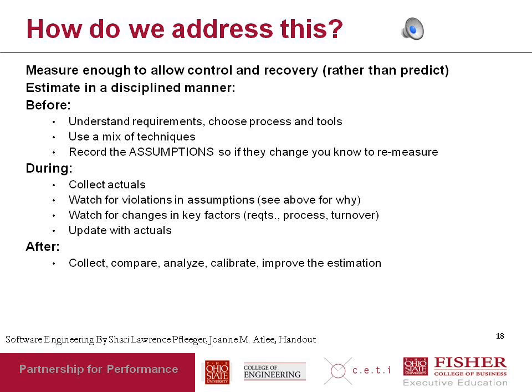And then secondly, as you finish an iteration, take the actual numbers and use that to calculate your overall cost. So at every iteration, you're replacing estimates with actual numbers. So your total estimation is reducing in uncertainty, because more and more of it is based on fact as opposed to estimates.